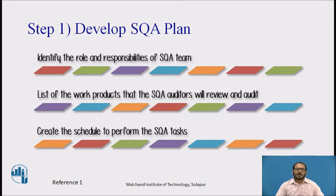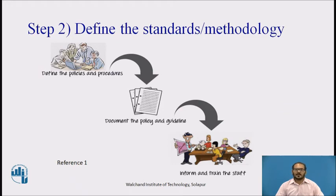In the software quality assurance plan, the test manager should do the following: identify the roles and responsibilities of the software quality assurance team; list the work products that a software quality assurance auditor will review and audit; and create a schedule to perform the software quality assurance tasks. The next step is to define the standards or methodologies. To review the management activities against the standard process, define the policies and procedures intended to prevent defects from occurring in the management process, document the policies and procedures, and inform and train staff to use them.